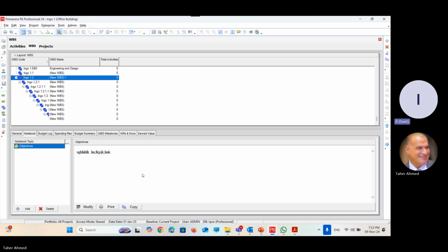Then what? After creating the work breakdown structure, what will be the next step? The next step is going into further detail. What is the further detail? We use something called activities. Now it's time to start with the work packages we created in the WBS and start creating the details of them. The details are again named activities, which in Microsoft Project are named tasks.